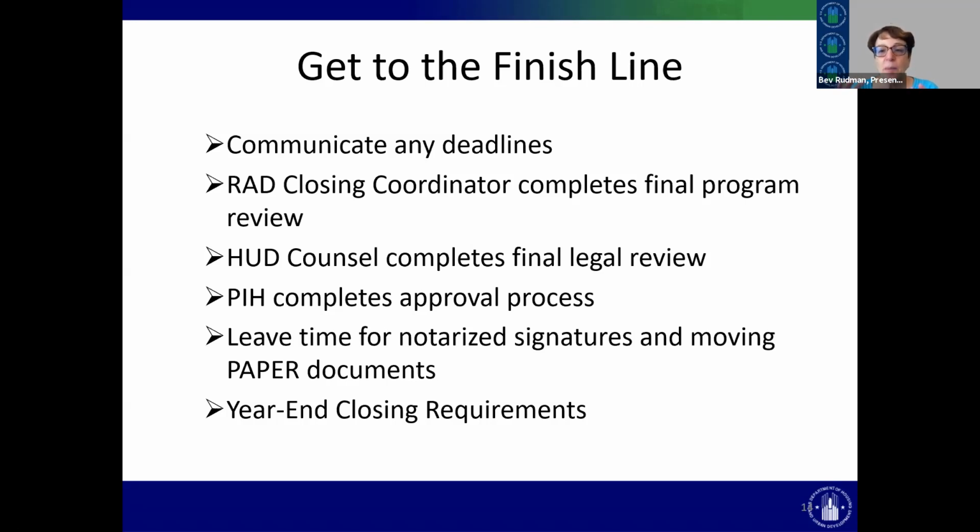And again, make sure when you calendar it out, leave time for notarized signatures and moving paper documents. That's always an issue, because we're all so used to pushing a button and something goes. But it's even more an issue right now because we're not all in the HUD building. We have a several stage process where it used to be basically one stage, because we have people meeting to make a final approval.